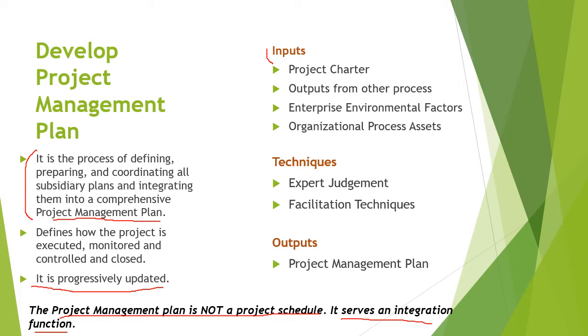If we look at the first input that is required to develop a project management plan, it is basically the project charter, right? The project charter is the first and the most important document that we require to develop a project management plan, because the project charter has all the basic information required to develop a project management plan.